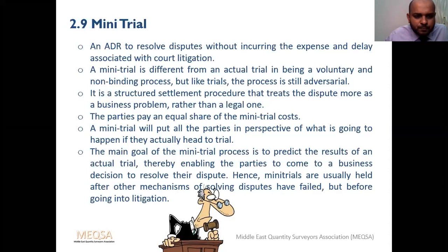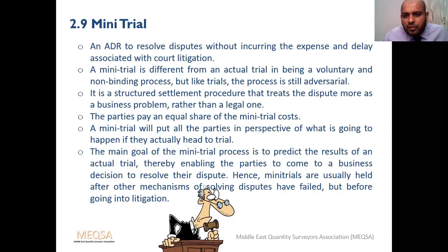The parties pay the mini trial cost equally shared. This is as per the agreement. Sometimes one party can also pay if both agree. A mini trial will put all the parties in perspective of what is going to happen if they actually head to trial. That means there should be a proper agreement in a mini trial, and for all the alternative dispute resolution, because there is no binding unless you agree otherwise.